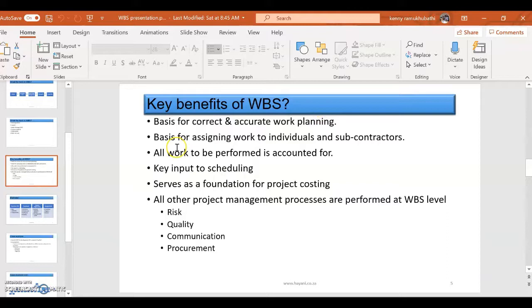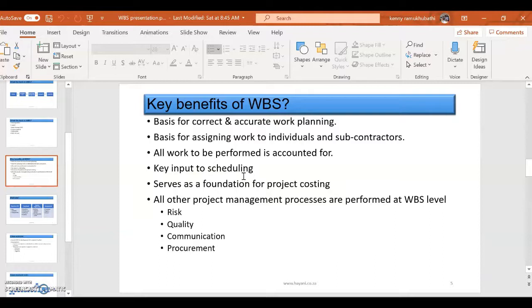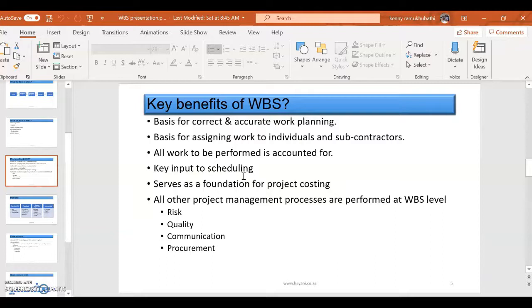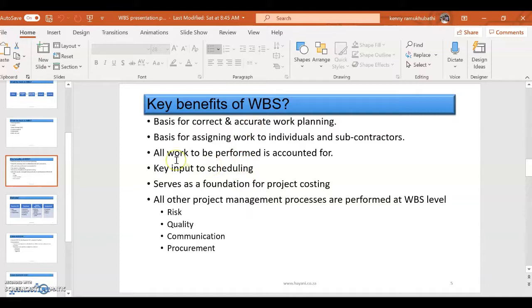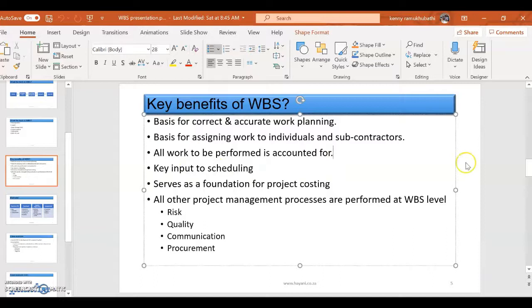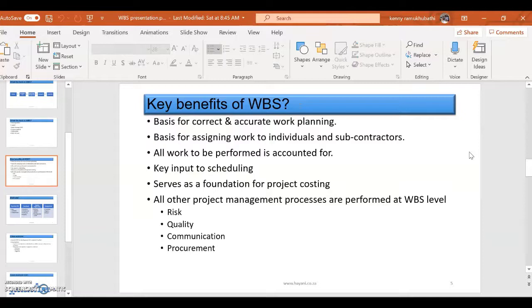Also, it's a basis for assigning work to individual subcontractors, because after you've got work breakdown elements, you can actually assign work according to that work breakdown element. Obviously, downstream after work package, you're going to create activities. That's now under the project schedule management, where you're going to identify, estimate, and actually sequence the activities. So you can actually break down work packages into activities. If you're trying to manage to a very detailed level, all work to be performed is accounted for.